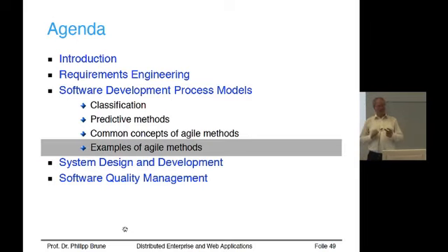And it could be that the definition of done includes completing the functional requirements document. So you say, okay, the functionality is only implemented if it has been documented and the functional requirements document updated. And therefore you can create the documentation. But of course, the documentation grows iteratively. So you don't have the documentation in the beginning, but only at the end together with the final software. Okay.